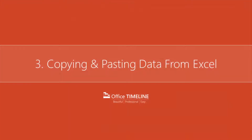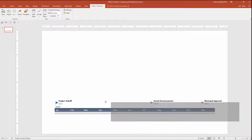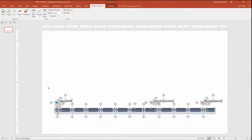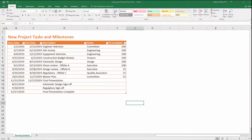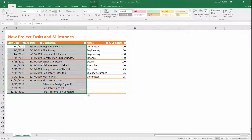Here in PowerPoint, I have an Office Timeline graphic with just a few milestones. But if I flip over to Excel, I have a bunch of new project tasks and milestones that I want to add to the graphic. To add these, simply select the start date, end date, and the description. If you have notes or a percent complete to bring over from Excel, you'll need to import your graphic, which you can see how to do in some of our other Office Timeline Plus training videos.